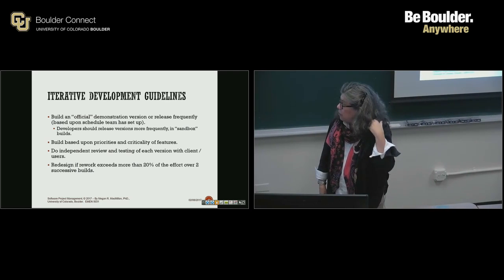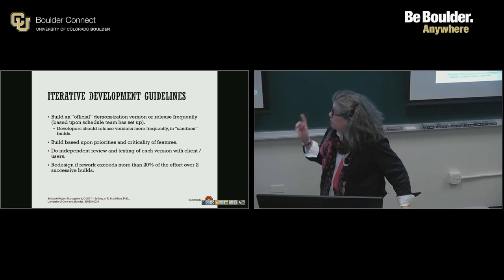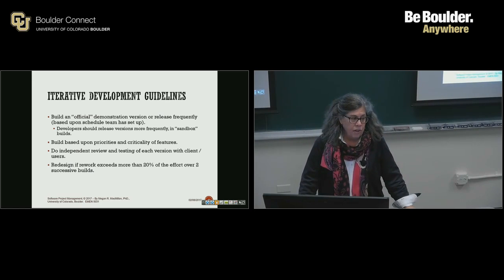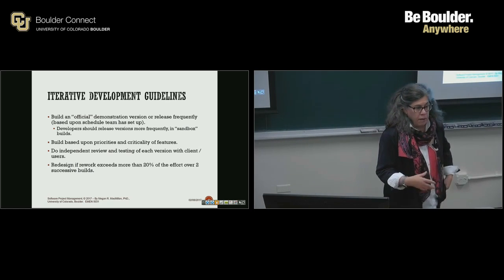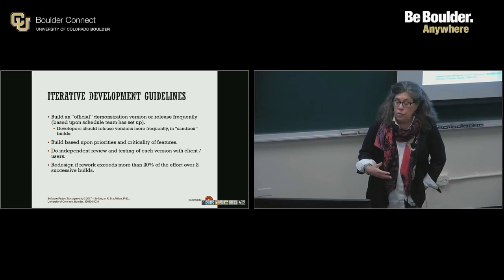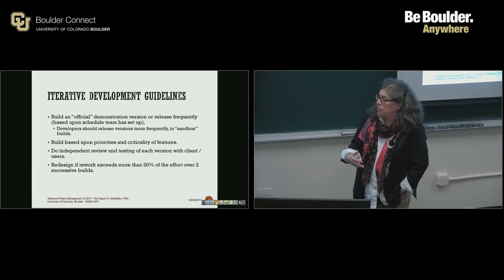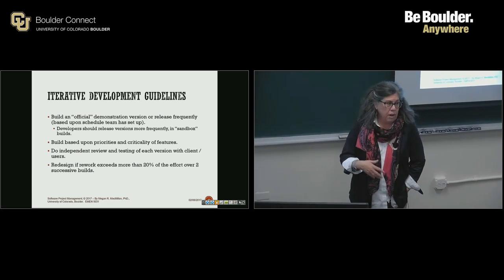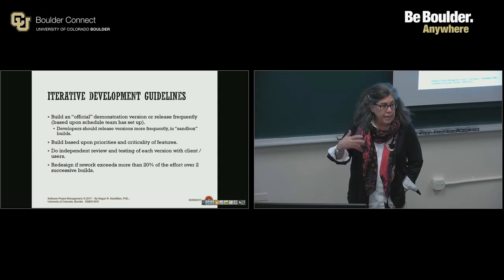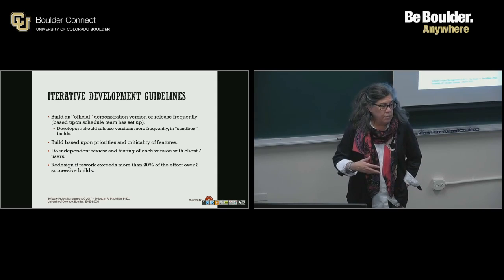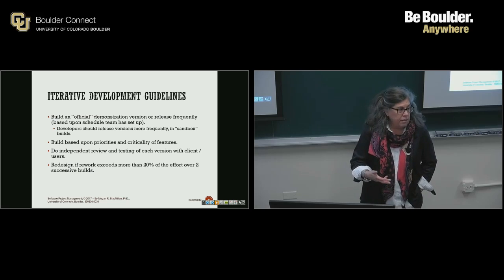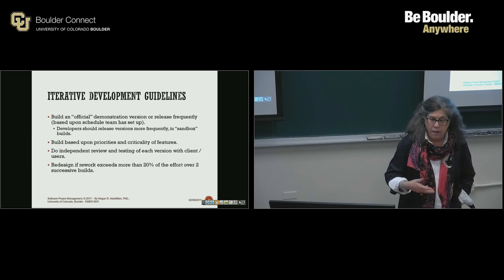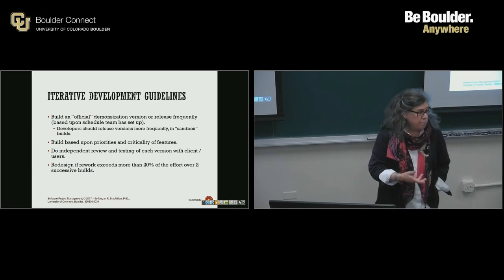At each point, though, you should be doing a review and testing of each version with your clients or users. Make sure: is this right? Is this what you wanted? Is this working the way that you expected? After about the fourth week or second sprint, we start doing a sprint demo with our client at the end of every sprint to ask those questions. So we can start to get feedback and make sure that when we finally release it, it's not a surprise. We don't have to go through endless end user testing. It's basically what they want.